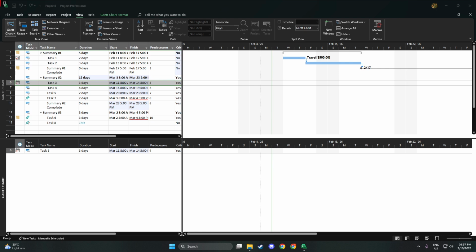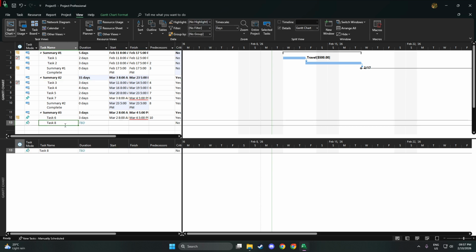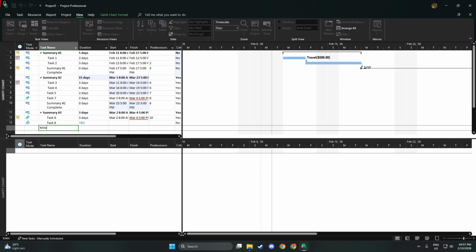First, create the milestones that will define the span. Add a start milestone at the very beginning of the period you want to cover. Set its duration to 0, so it's a true milestone and doesn't add any unnecessary time. Then add an end milestone at the end of the period, or the main phase your Hammock should cover. These two milestones act like anchors. The Hammock task will stretch between them.